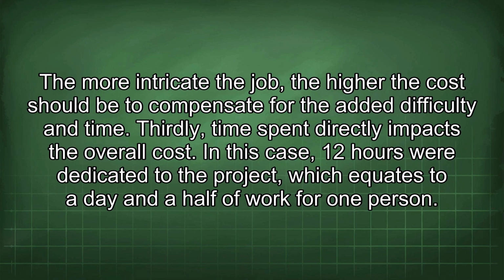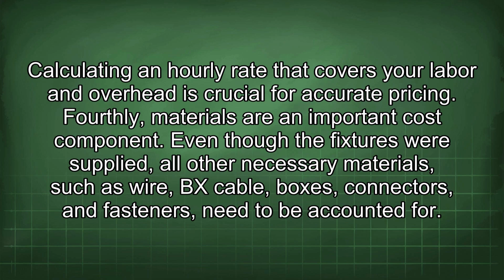In this case, 12 hours were dedicated to the project, which equates to a day and a half of work for one person. Calculating an hourly rate that covers your labor and overhead is crucial for accurate pricing.